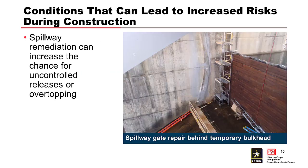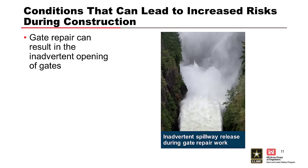Spillway remediation that takes the spillway out of service for a period of time can increase the chance for uncontrolled releases or overtopping. This photo shows an example where a spillway gate is taken out of service and repairs are being made downstream of a temporary bulkhead. Gate repairs can potentially cause gates to inadvertently be opened and result in an unplanned release — there was a dam in Vancouver, British Columbia where gate repairs led to the gate suddenly opening, resulting in a major release that ended up with a fatality in the downstream channel.